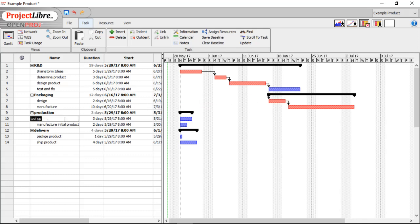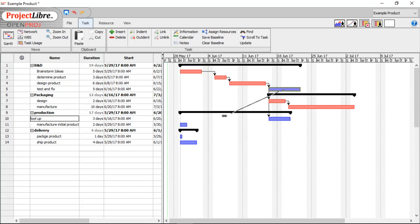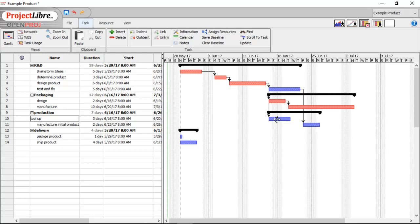And we have to design the packaging before we can manufacture it. Now, when can we tool up our facility? Meaning we're going to start preparing it for production. We can do that again after the design of the product. But when do we want to actually manufacture the first ones? We don't want to do that until we've tested and fixed everything. But we also have to wait until tooling up is done. So we'll make both of those predecessors to manufacturing the initial product.